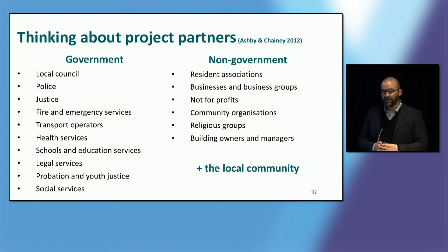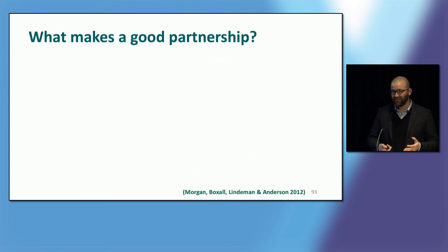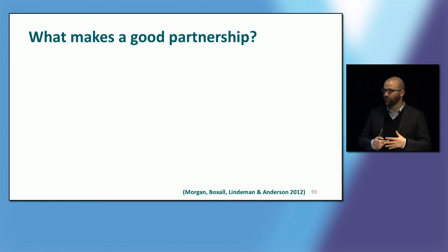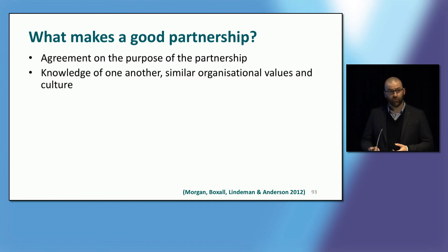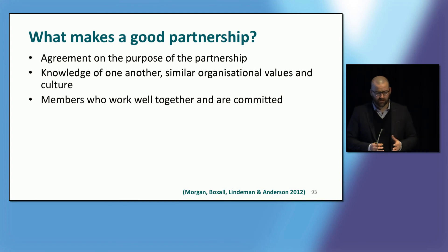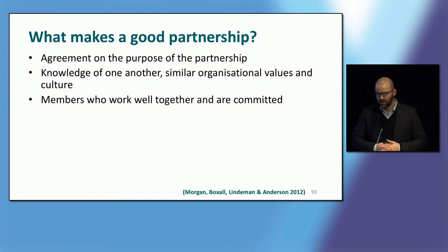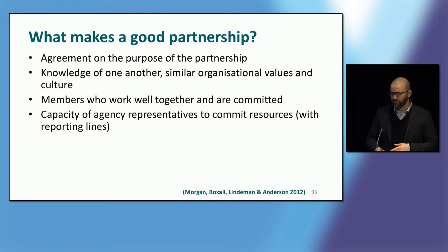Of course, remember that the local community is an absolute vital partner as part of your project. There's some really good evidence around what makes a good partnership. Being really clear about why someone's involved in your project as a partner is actually really important. Being familiar with one another, and the risks that might present from working with an unfamiliar partner, is also really important. It's really important to have members who work well together, are committed to the partnership, and actually have the capacity to commit resources. We've seen devolution of responsibility to people who can't actually commit the resources their organisation had originally promised.